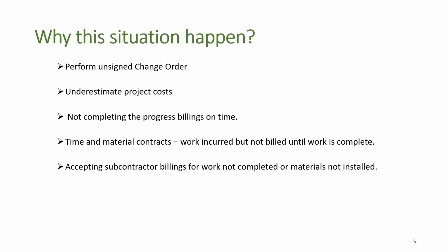For some small jobs, for example, we sometimes have to promise a client that, hey, I'll finish this job, but it's okay not to get paid until the end of it. It's not a good thing to promise, but sometimes we kind of have to, just to get small work in place maybe. And for that period that we don't get paid until the work is completed, that's underbilling.